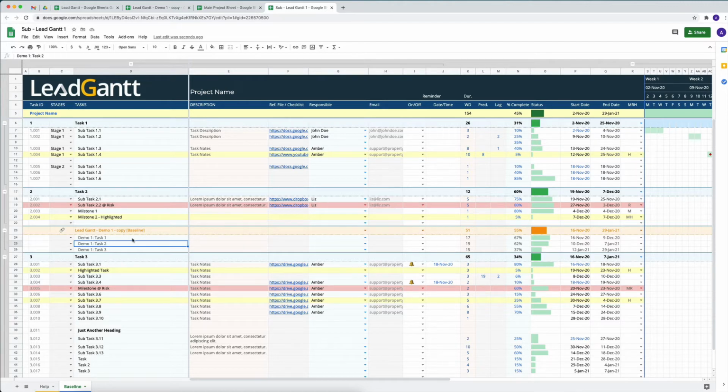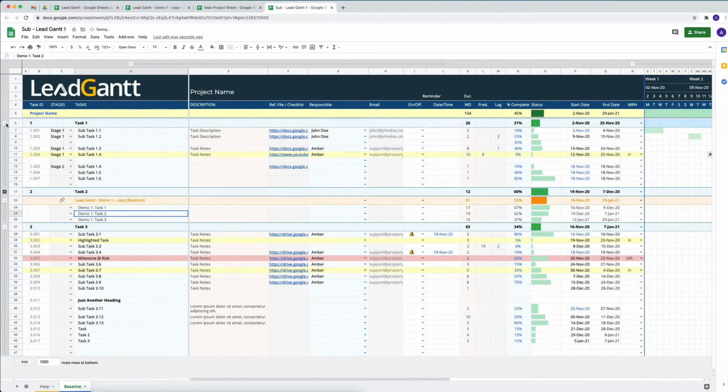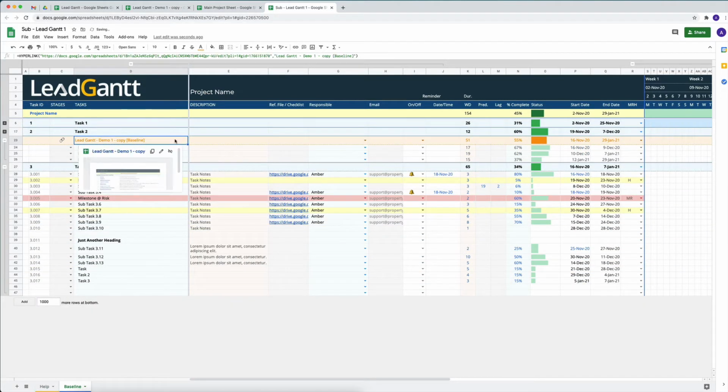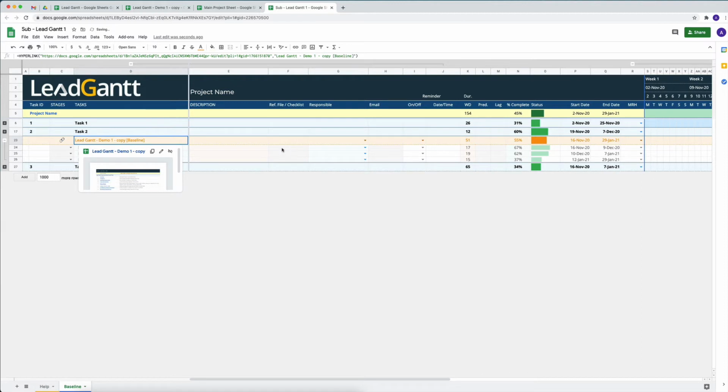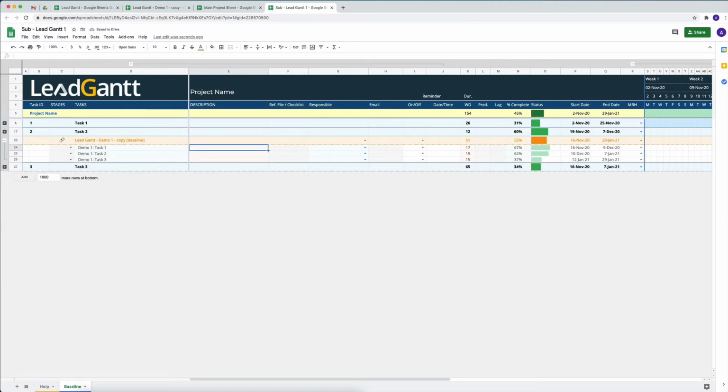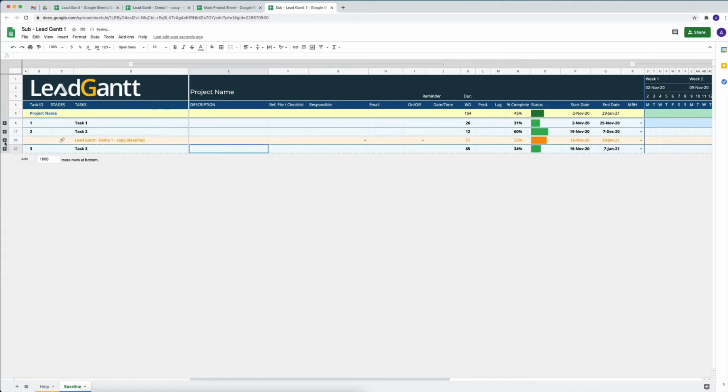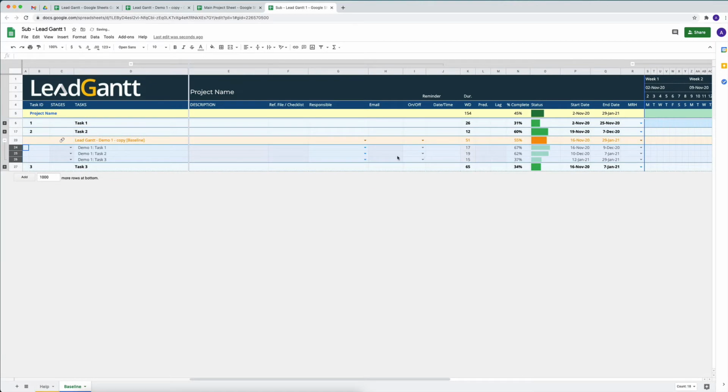However, it will bring in the dates that we get, including the orange section, because every sheet will give you the start date and the end date for the project based on all the blue sections as well as the sections that are linked to it. So all the orange sections basically mean that it's a link, or an update coming in from another sub sheet. But your start date and your end date will always take into account all your sections, so not just your blue sections, but also your orange sections.